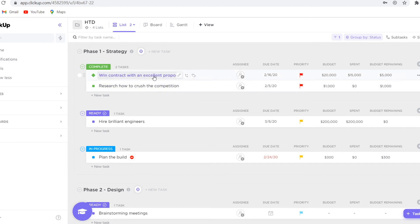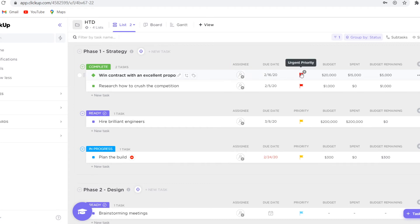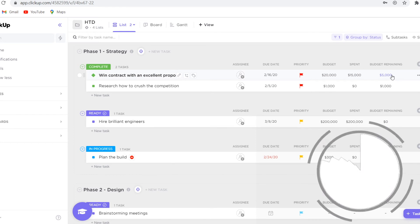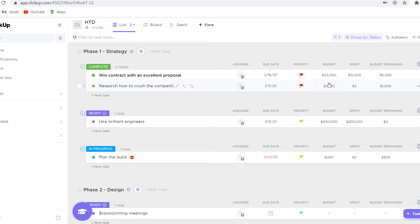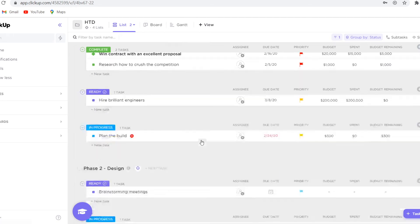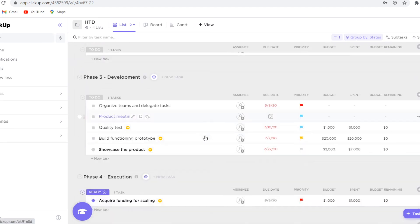Right now I'm in the workspace HTD, which is for this specific channel. You'll find different tasks here — this is great for project and task management so you can list them and assign people to a specific task. If you're working with a team, you can add tasks for a week and add the people who need to do that task. You can then add a due date, add priority if needed, and even add a budget for a specific project.